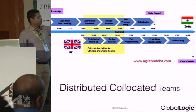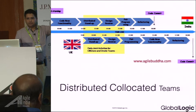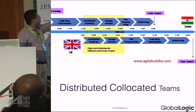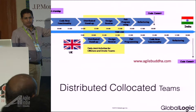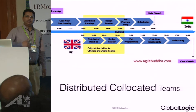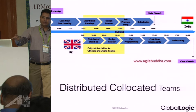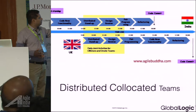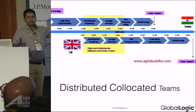Let's start thinking about distributing across two locations. You have some people working in the UK and some people working in India. The India team starts working from nine o'clock in the morning. They do the local standup at nine o'clock, then start coding new functionality. Then, for example at twelve o'clock, there is a distributed standup where, in case there are troubles, we find out who needs to connect with whom. We need to do distributed pair programming with that person — those kinds of decisions take place during this time. These are the core hours where the two teams work together.